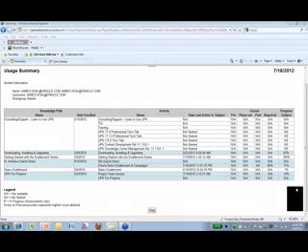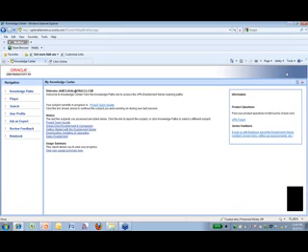So it really tells people up in the project management area or at the high levels, if they want to say, right, we're going to go live with the project, how ready are the users? We can run a very comprehensive set of reports to say that yes, the people in this part of the world are ready and they've done all the training and they've all passed it, etc. Or things haven't gone quite so well, and you might have a bit of a red flag there. So it really starts to give you that sort of granular detail around the people's use and adoption of the content.